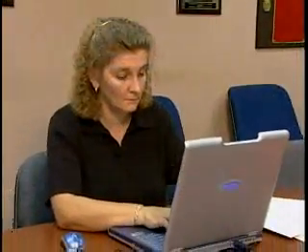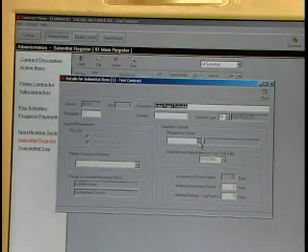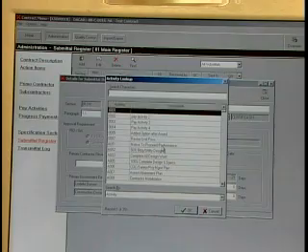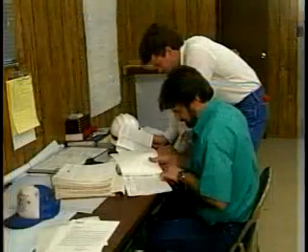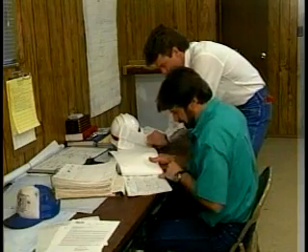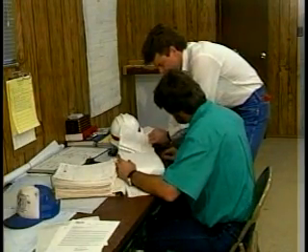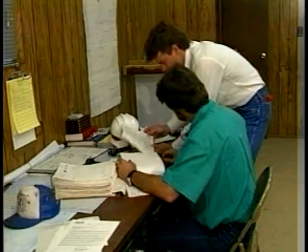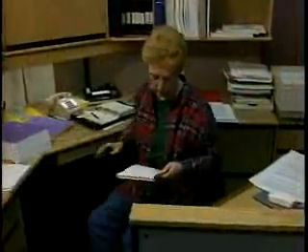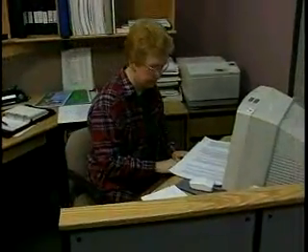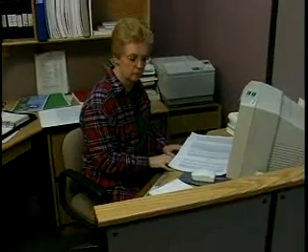The contractor must integrate the submittal process into the quality control plan and delegate submittal responsibilities to the proper individuals on staff. The government considers the handling of submittals to be extremely important. It is the contractor's responsibility to assure that all on-site management gives the required attention to submittal procedures at all times. QC personnel are responsible for ensuring, through detailed review, that all submittals are in full compliance with the contract.